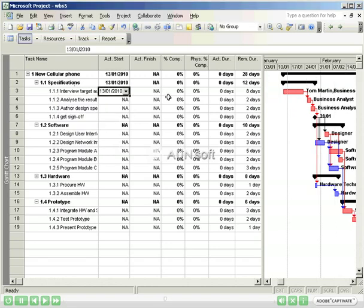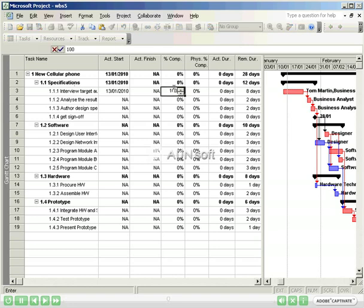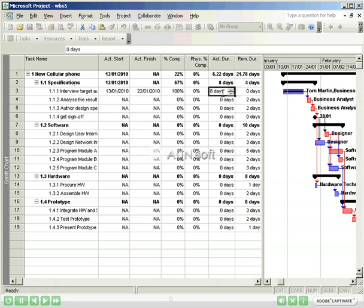I'll mark the task as 100% complete. But instead of taking 8 days to complete, it took 12. And I'll record the 12 days that it took in the Actual Duration column.